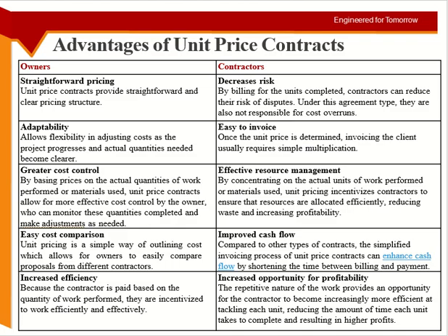Okay, the advantages for the owners and contractors. For the owner, the pricing is very straightforward. If I need this much amount of work, I need this much cost. Then for the contractor there is less risk of getting in dispute with the client. If the work is more, he will be charged more. If the work is less, he will be charged less. So he doesn't have to fight with the client every time about I did this much or that much, and this happened or that happened.